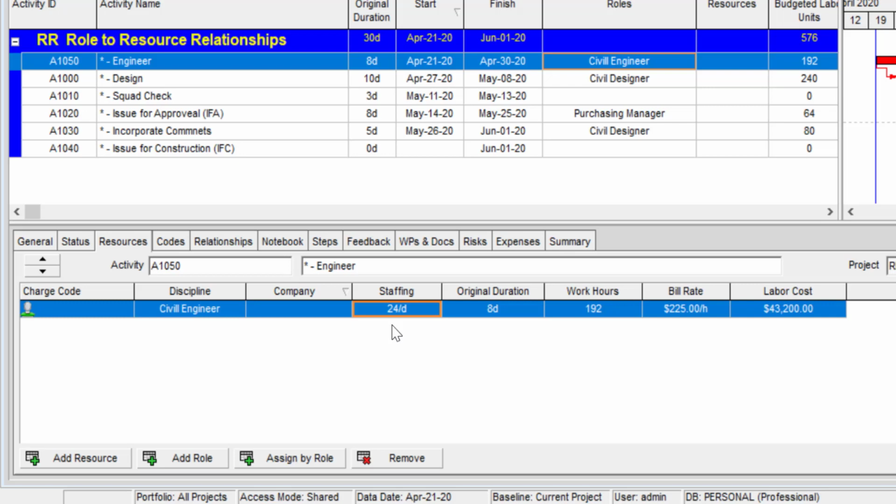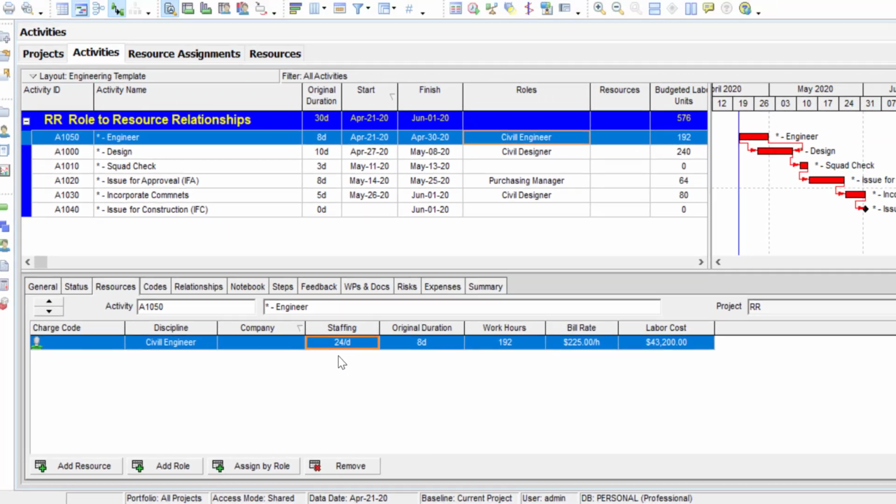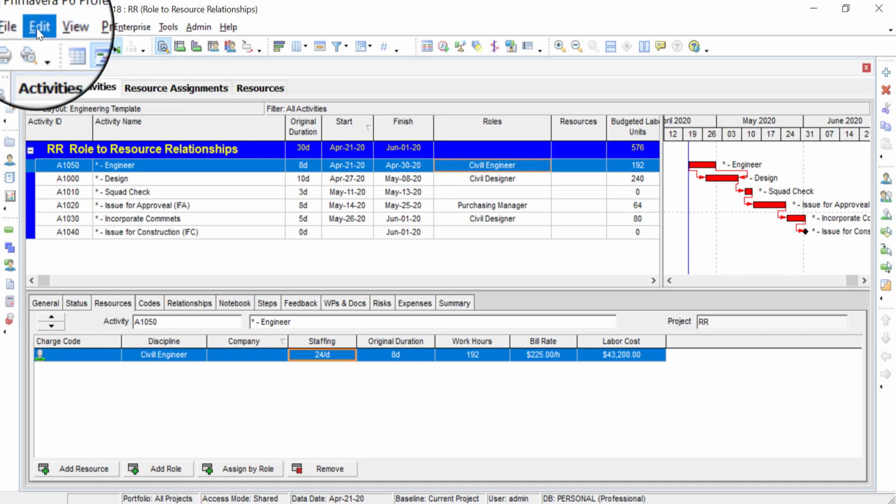So it looks to me like that's 3 people on an 8-hour day, if I were guessing, but I'd have to actually say, like I said, go look at the calendar. But if you are role loading, even resource loading your schedules, and you want to make it easy for your craft loading piece, you can actually change your duration format to hours. And let me do that. I'll show you how that works.